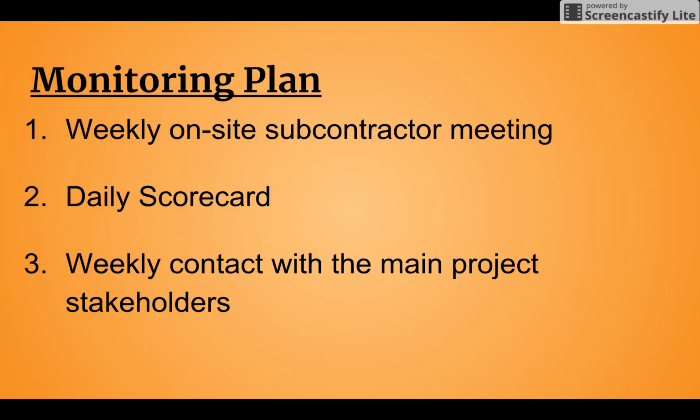Another monitoring tactic that we'll use is the daily scorecard, which will involve the superintendent going through the job site at the end of each day and basically just keeping track of what did and did not get done. If you don't do that, subs might think that they did everything they were supposed to, and sometimes word of mouth isn't enough. Sometimes the project superintendent needs to actually go there and visually see what was and was not done, and go around with a checklist and take note of all that.